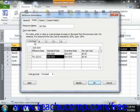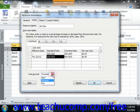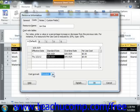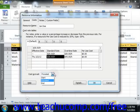Also note that for costing data, you can indicate when you want the cost to be incurred by using the Cost Accrual drop-down. This will tell Microsoft Project when to report the costs as being incurred for this resource. The default value is prorated, meaning the costs will be shown as the work is accomplished. However, you can also incur the entire cost at the start or end of the assigned task.